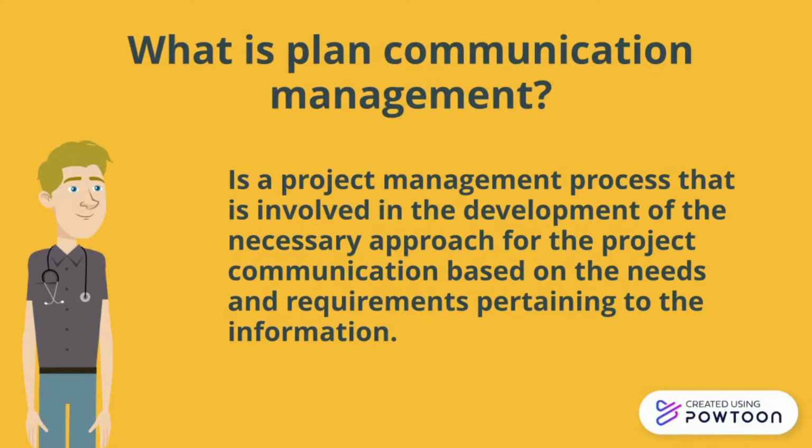It is important to take note that this project management process can be iterated as long as it is triggered by the control communication process. This means that this process has a continuous nature and can be triggered by the comparison of the actual and planned schedule, cost, and quality. Lastly, it is crucial for the project manager to evaluate the information to ensure that the right message is delivered to the stakeholders.